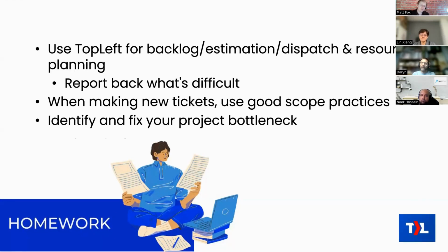And what I mentioned about the bottlenecks last week, that doesn't apply just to service, it applies to your project environment as well. So Lynn, you had said you perceive that what I said, especially about the senior engineers, you might be affected by that. Well, do some more thinking about that, see if that's true. Another thing that you could do is make sure that you've got the right Kanban boards to see if you can represent that backlog visually. So you've got a hunch that it's your senior engineers who are a backlog for you. Well, look at the member swim lane board for your project team and see if that is in fact true as demonstrated by the Kanban board. Is it your senior engineers who have the most tickets and the most overdue tickets? If that's the case, as reflected on the Kanban board, then yeah, you're probably right. It's your senior engineers who are your project bottleneck. So the Kanban board can help you prove or disprove that theory.